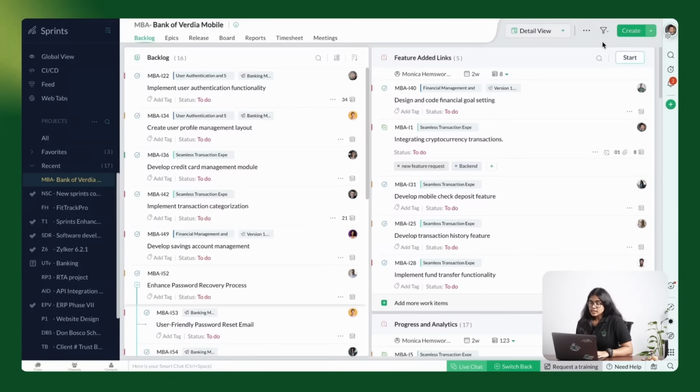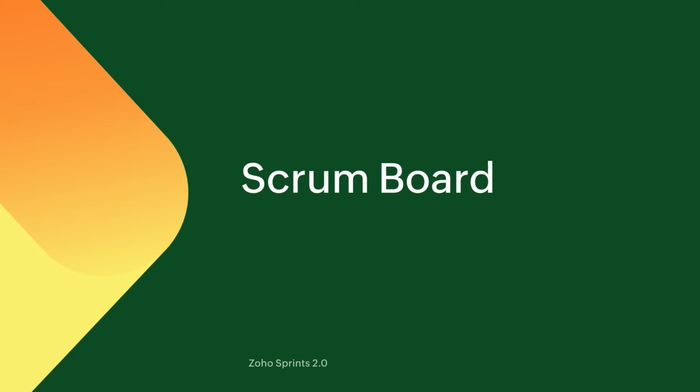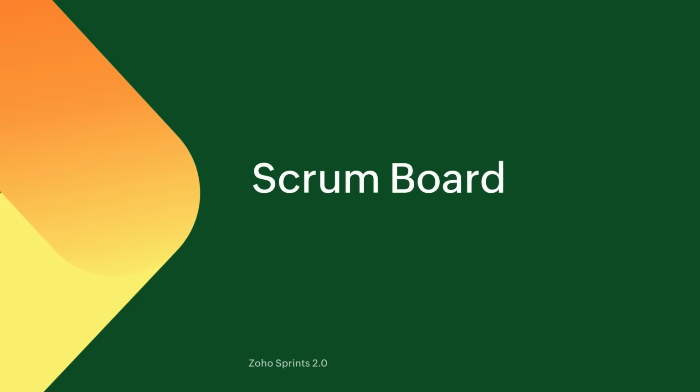With your backlog groomed and sprints planned, now let's kickstart a sprint. Click on Start button of any desired sprint from the sprints backlog. No sprint will be visible on the Scrum board until you start a sprint from the sprint backlog. A Scrum board is a visual representation of all your active sprints.